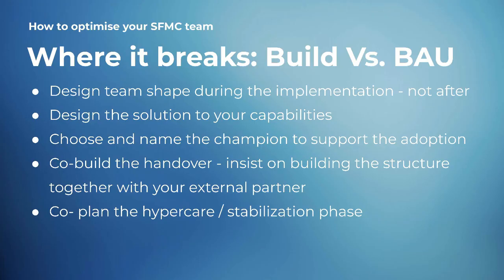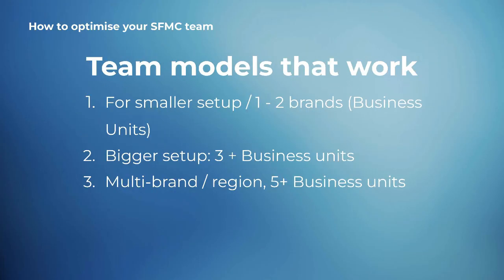Depending on the scale, it can be from a week to even a couple of months. How do you monitor? How do you plan the further migration? Co-plan this sensitive phase with your partner, and be proactive here, and be realistic when you're approaching this phase. The effort will be needed. You can plan this effort together with your partner, but you need to plan your capacities. These are our recommendations for this important phase.